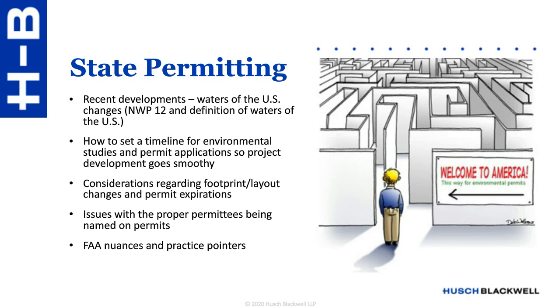So Megan and Ben are going to talk about that, and the proper permittees being named on permits comes up a lot. We see this when we do these projects where you might have an early stage developer that goes out and acquires a number of permits or makes some registrations in their name, and then when they assign the project to its next owner, they assign the project, but sometimes it's necessary to go back and renew or amend all of those permits to get the right name. And so you have to build in flexibility into your schedule for doing that.